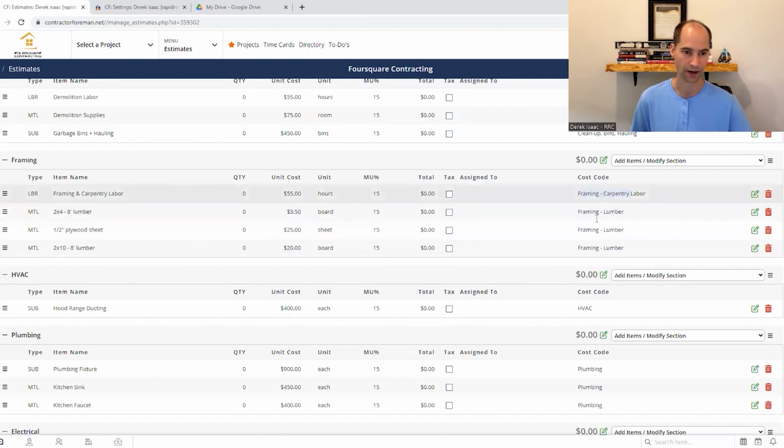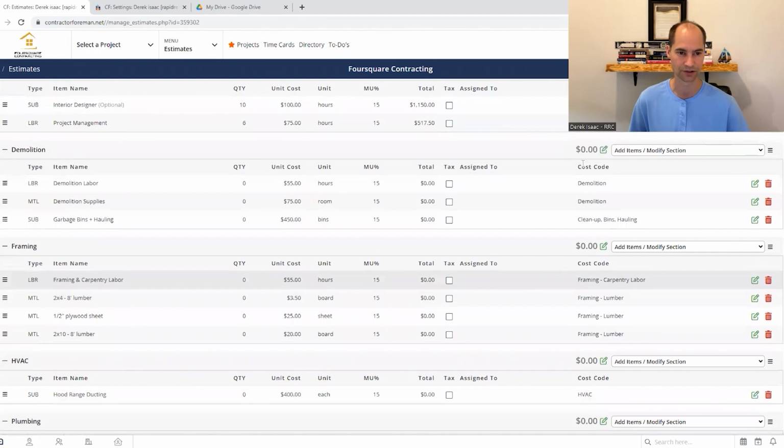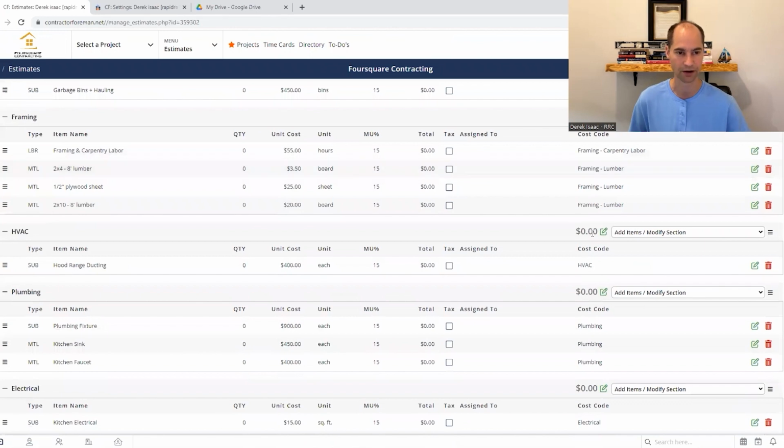Cost code. Everything should have a cost code so that we can track later the framers, whether it's your own or the subtrade. They took 5 hours more than we expected. Now we're out whatever, $600. Why did that happen, or should we have estimated more? So always have cost codes, because you can track the cost of a project and see how your actuals compare to what you've originally estimated.